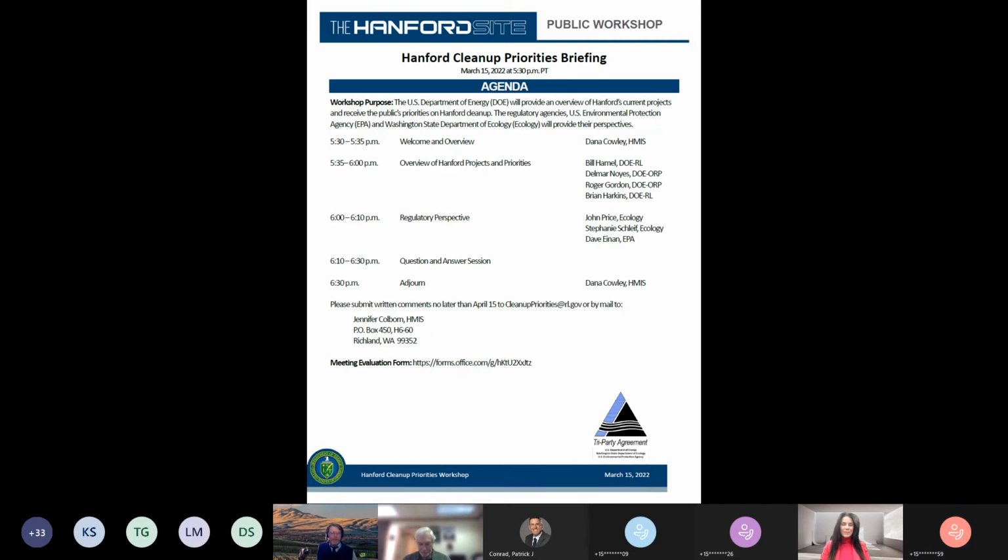Yeah, this is John Price, and I put an answer in the chat. So from Ecology's perspective, a compliant budget request is one that will complete all requirements, whether they're from TPA milestones, from permit requirements, or anything else, on time. So that's our definition. Ours would be very similar. It would be on time or as soon as practically possible, because there may be certain things, depending on where you're at a point in time, where you run into work densities or something. But ours is very similar, with the caveat that it's done safely, of course, and that practically it can be done. All right, thank you.